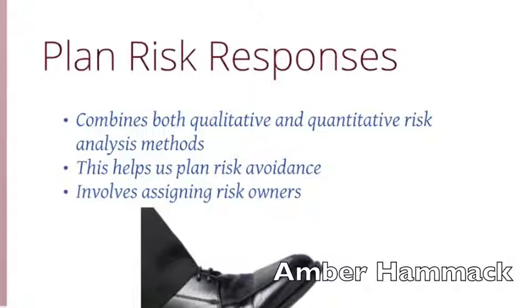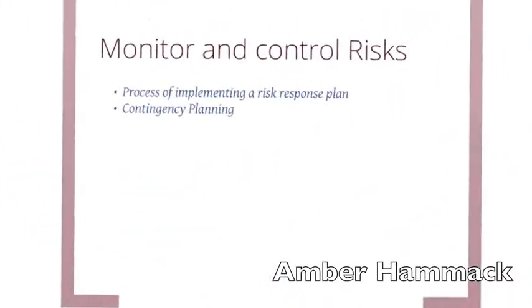This is done by identifying and assigning an agreed-upon individual to be a risk response owner for each particular risk. This person takes responsibility for allocating time, funds, and effort as needed for the risks involved. This person is also responsible for creating options to handle and control risks, building consensus on each risk resolution, and ensuring that they are time and cost effective.